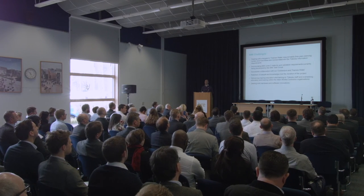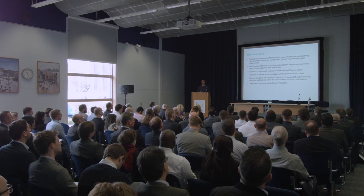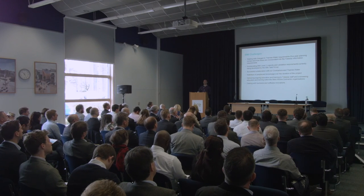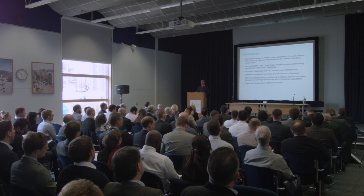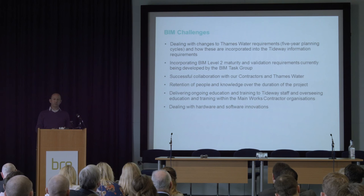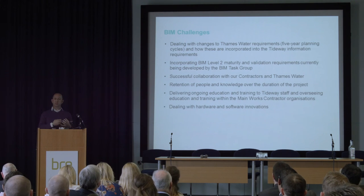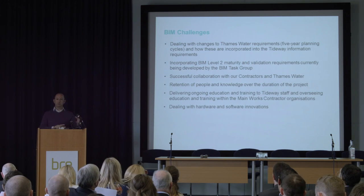So some of our challenges, I've talked about the fact that Thames Water is our client. So they go through with all the utilities and offer a five-year planning cycle. So this is a problem with big infrastructure projects that go over a long duration. The next one's due in 2020, so we will be impacted by that. And we're working with Thames, that they themselves are going through their own BIM journey with 820, and they have a chance every 12 months to influence what we're doing on the project.